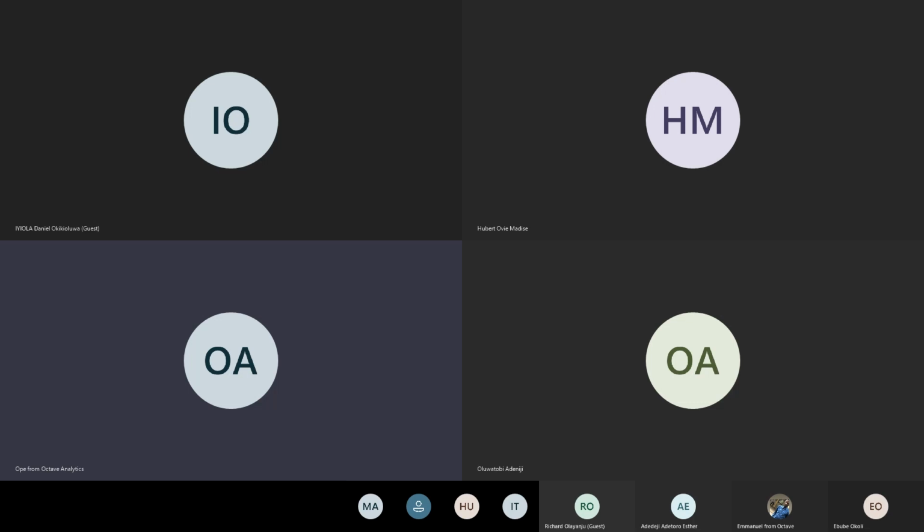Within 15 minutes, every project team member, depending on how large the team is, or every project team unit representative, gives a summary of the task that's been assigned to them.